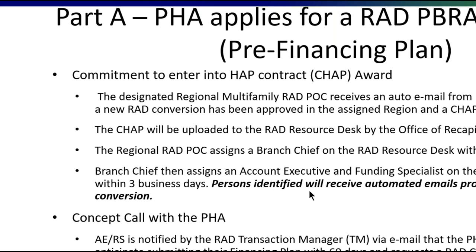With the PHA, they will have that, and that normally happens about 60 days prior to them submitting a financing plan. So that's kind of a sign that the transaction is moving forward. The CHAP has been issued. You have a concept call. You discuss what it is the transaction will be, whether it will be financing or not, and you'll move ahead